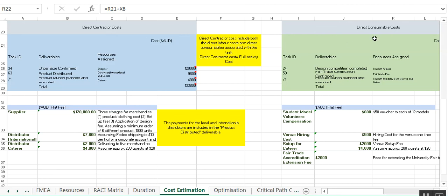And sometimes we link in direct consumable costs, which are different than the labour costs. Again, the analogy is pretty straightforward. You're building a wall, it may take longer, but the amount of bricks you're going to be using to build the wall will be different. However, there can be some variation in the consumables in terms of how much the components will cost, and therefore 1,000 bricks might move from being 500 to 800 to $1,200. So again, just a bit of logic there is always useful.